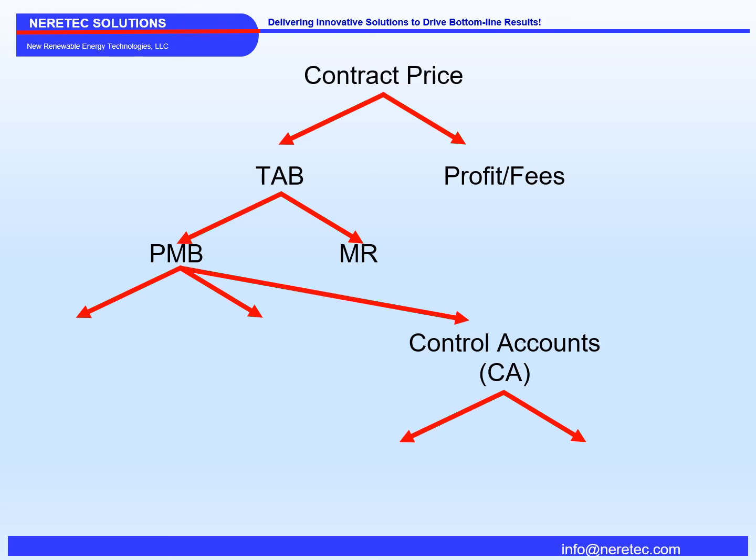The control account is responsible of two things. They have responsibilities for the work package and the planning package for that particular WBS. The work packages are the near-term detailed plan activities. The planning packages are the far-term activities not yet defined into work packages. As I said earlier, the performance measurement baseline had three components. Let's discuss the two other components.